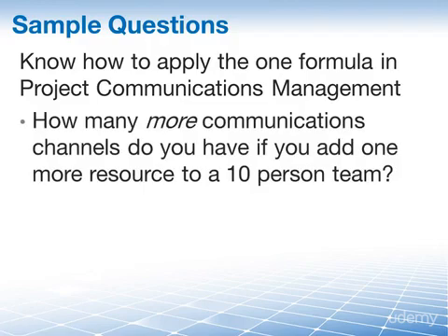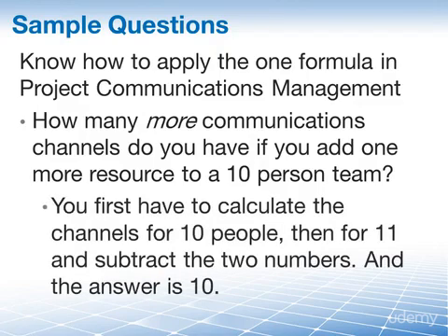How many more communication channels do you have if you add one more resource to a 10-person team? Well, in order to answer this, you first have to calculate the communication channels for a 10-people team, then for an 11-people team, and subtract the two numbers. And by the way, the answer here is 10.